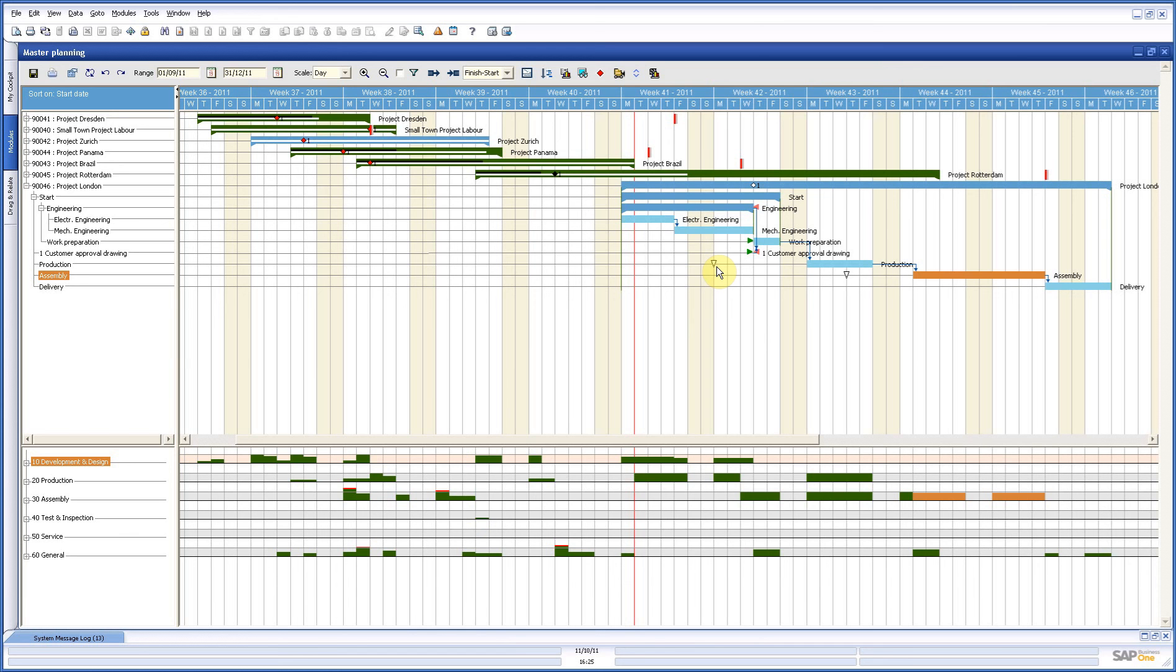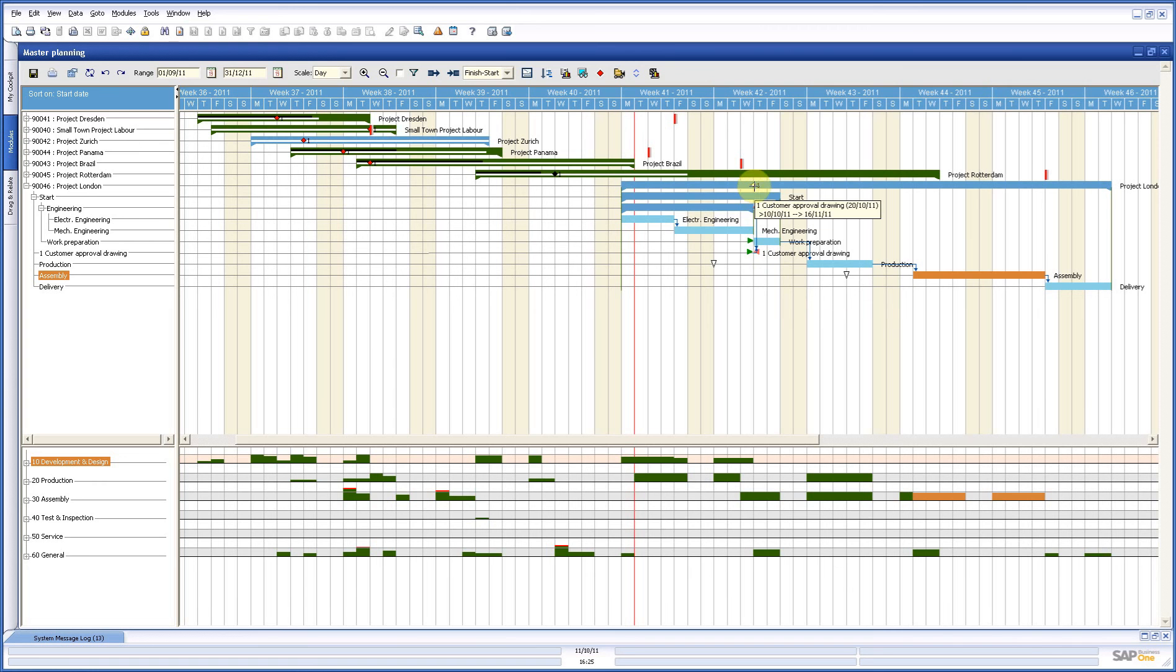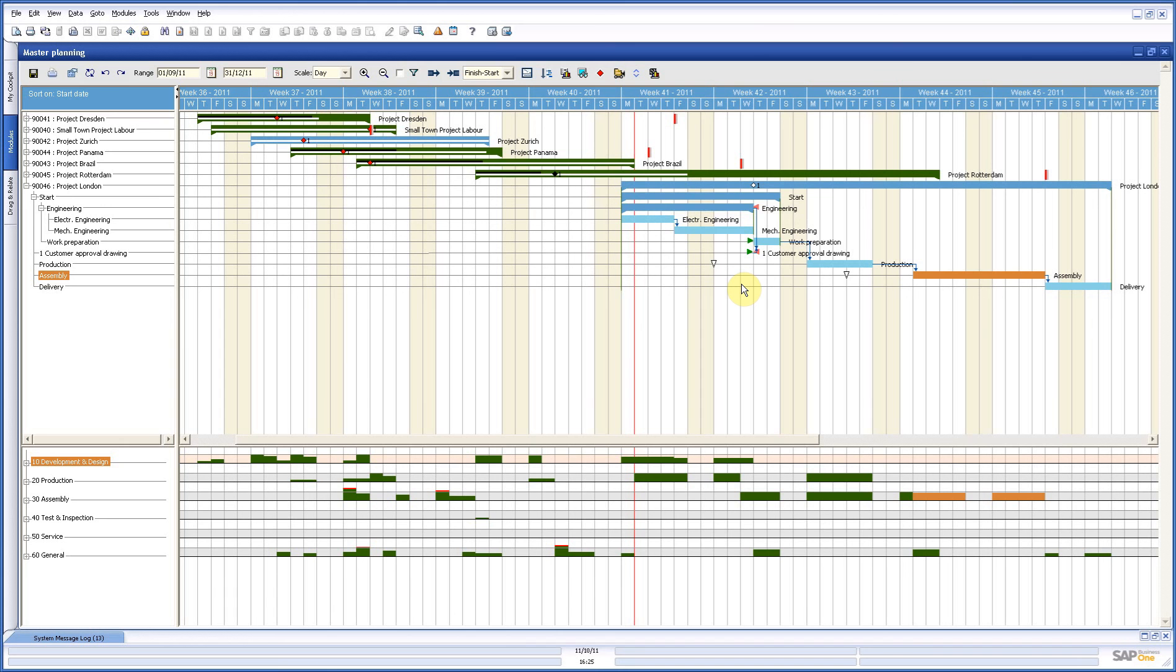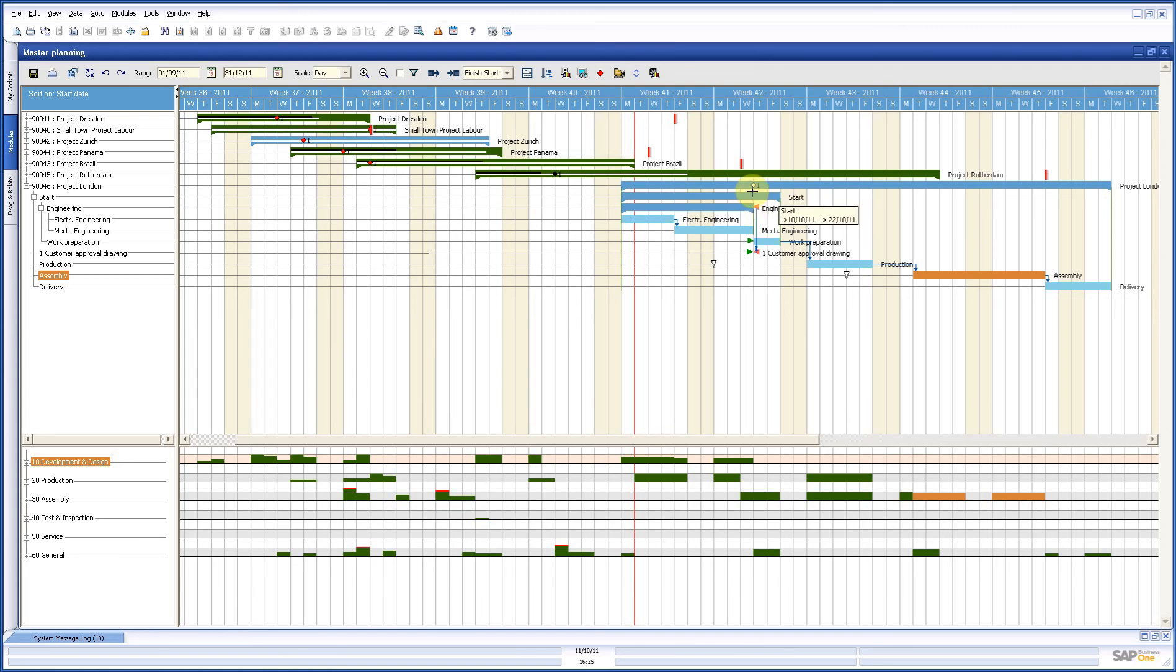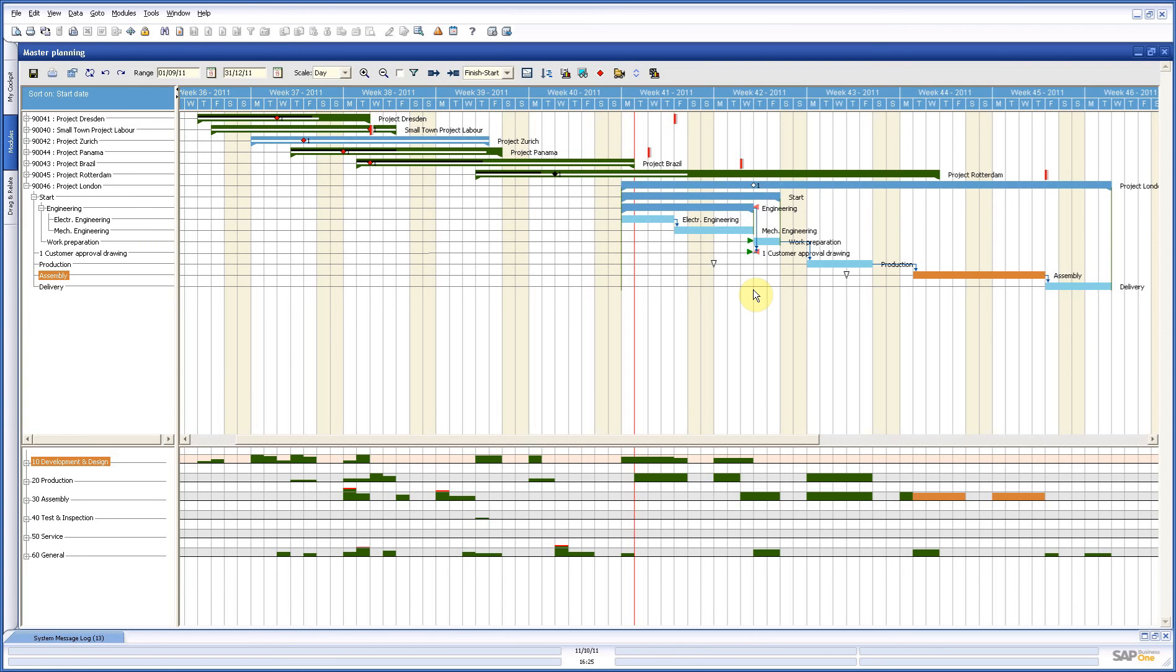And the last thing important for this planning project is this icon, the green and red angle, which represents a milestone. And you can also see that milestone on the project bar above. Milestones are very important. They can mean very important steps in your project. And in this project bar, you can have a couple of milestones. And one of the things you can do is link invoices to this milestone. So what could be here is that if this milestone is finished, you can send your first invoice for instance.